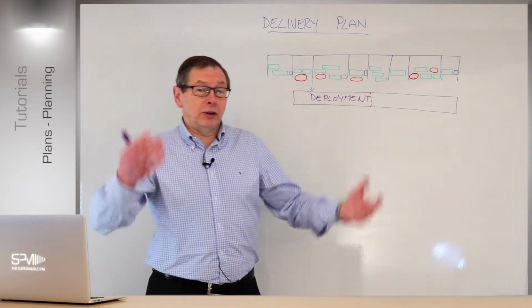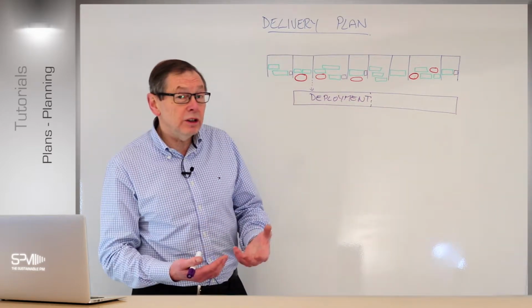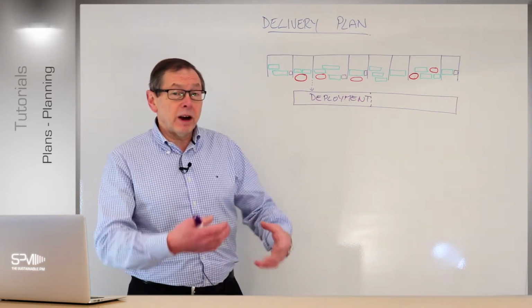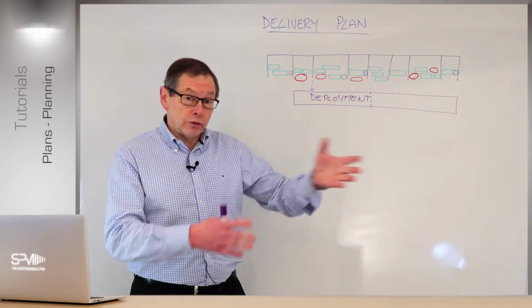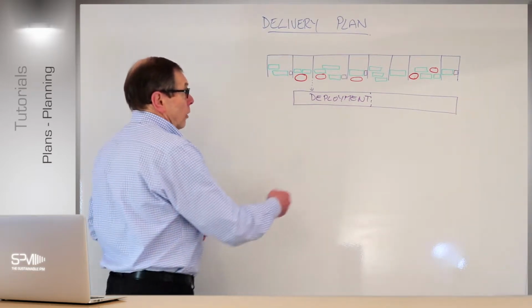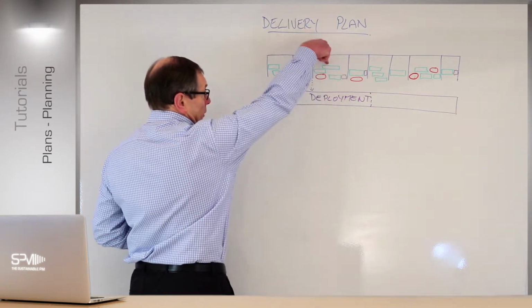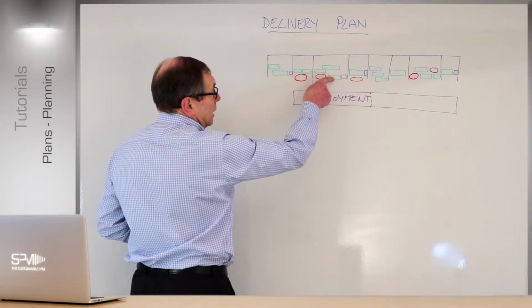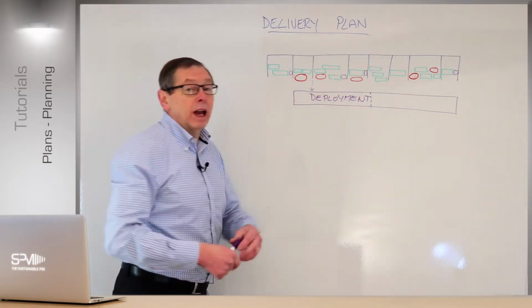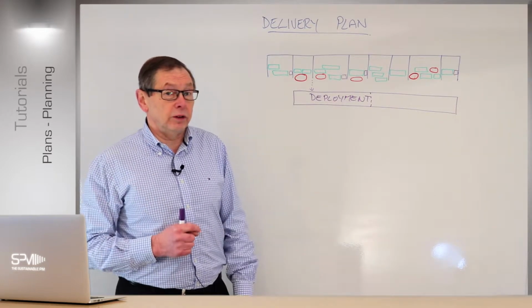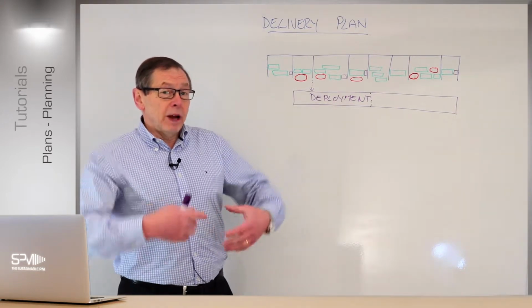If you're building a website, for instance, somebody might be putting the coding together, another group might be putting the wireframes, another group may be building the graphics at a high level. Some of those resources, those members, may be the same member throughout. So I might have one member in this particular time box who's working in the first one here, and also may eventually work in that one here. And the same way here, you might have overlaps of resources, the same person working across 3 different streams for various reasons, right? So bear that in mind as well.